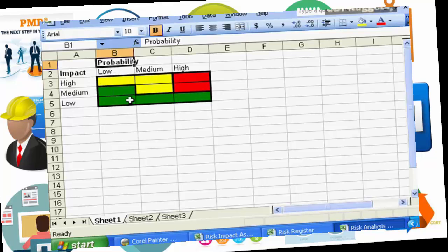If the probability of the impact is high, but the impact is low, you may still say that is a low. We don't care about that risk. That risk can be effectively ignored and dealt with as we go forward. So again, this is just another high-level matrix that you may want to use to determine your overall project risk impact.